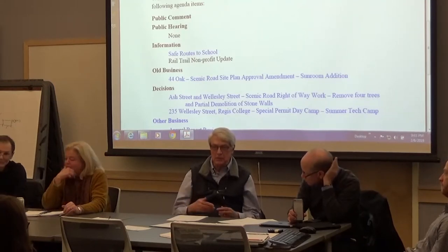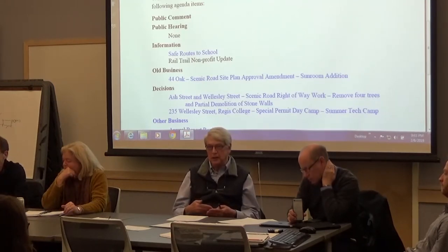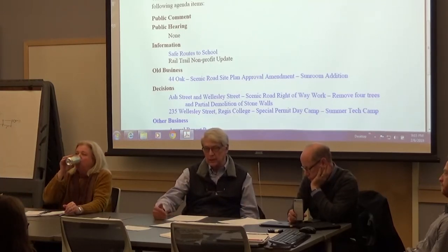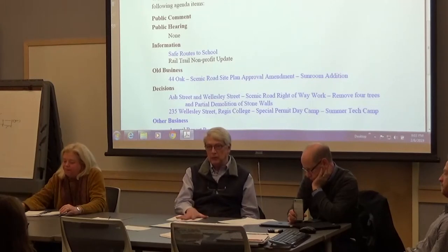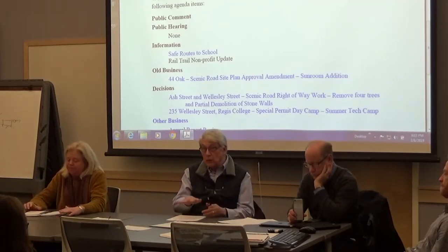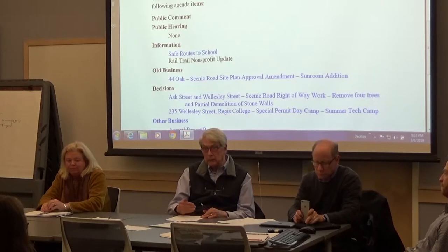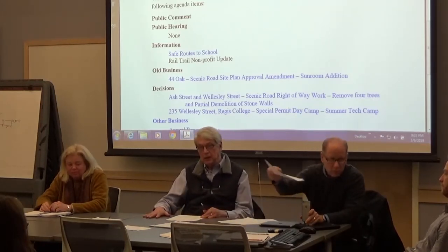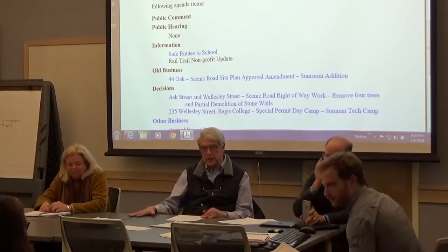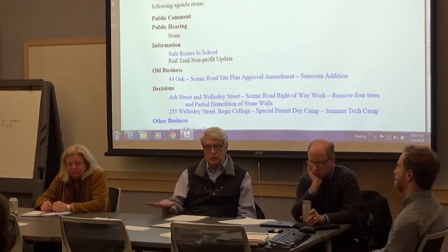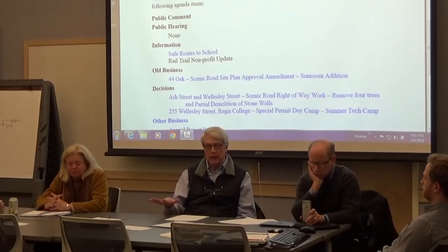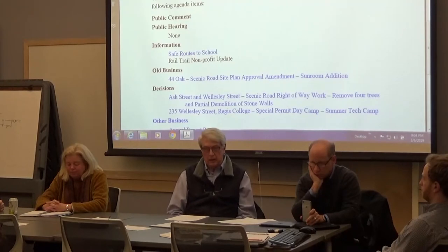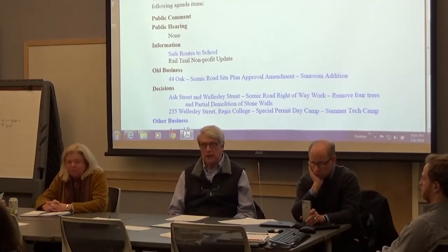As I said, there's a miscommunication here. We have to go through a process where we look at it rationally, not in bits and pieces. Compare what was originally approved with a totally coordinated drawing, with what changes are going to happen when the dust settles, and sign off on those exact changes. And it needs to be a record drawing that exactly shows what's going to be there at the end of the day.